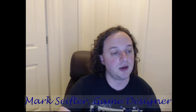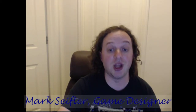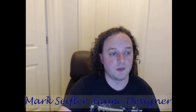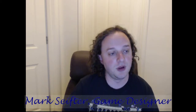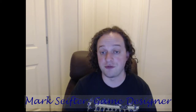We're back in editing. So we're doing some editing in the pre-layout pass. At some point, and I will tell you exactly which point this is, it is the point that the art actually has come in, enough art that we can credibly lay it out, which, whenever that happens, it is time for layout. Now, the cover hopefully might have come in earlier than that, but it doesn't really affect the layout super a lot. So once the art is in, layout begins,